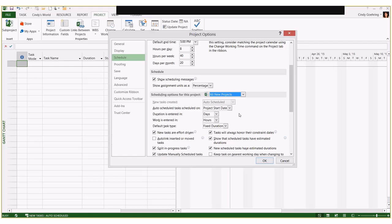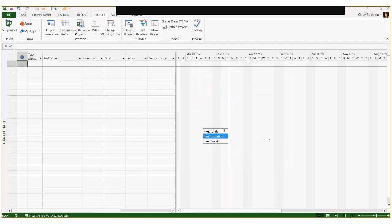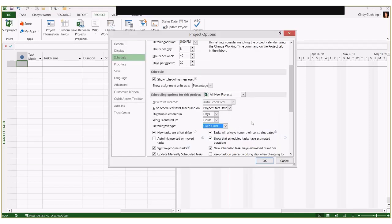The other option you need to be aware of is the default task type. By default it's fixed units, and I would strongly suggest that you almost never use the fixed units task type when setting up your schedule. It's either going to be fixed duration or fixed work. We'll talk about how to choose which one to use when we get to the section on estimating in just a few minutes.